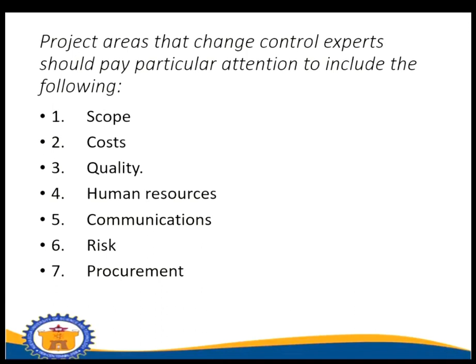Risk. Change requests must be evaluated to determine what risk they pose. Even minor changes can have a domino effect on the project and introduce logistical, financial, or security risk. Last is procurement. Changes to the project may affect procurement of materials and contract labor.